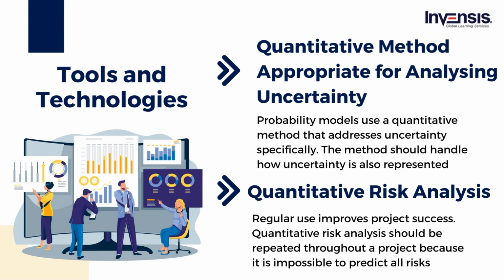The last characteristic is information for response planning. The project contingency reserve should be reflected in the project schedule and budget, and this is where quantitative risk analysis comes to the rescue. It provides information that may be used to modify the project plan if the overall risk to time and cost indicates that a scope adjustment is needed. The scope changes are agreed upon and documented. A new quantitative risk analysis is carried out to reflect the new aspects of the project.